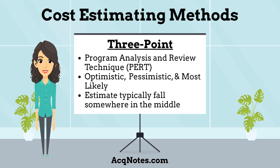The final cost estimating method is the three-point cost estimate. It is based upon the program analysis and review technique, called PERT, which has the project manager identify three separate estimates. One estimate is optimistic, the other is pessimistic, and the last is most likely. This scenario has the cost estimate typically fall somewhere in the middle.